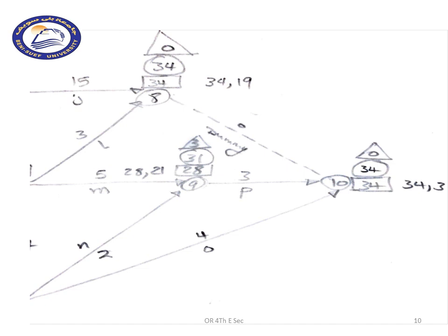It will give us 31, and we will deduct these times from each other, the earliest possible starting and the latest possible starting, which will give us the slack times that will be written in a triangle, like you can see here, with the outcome of the deduction of both the time in the rectangle and the time in the circle. Here at node 9, the slack time is 3.